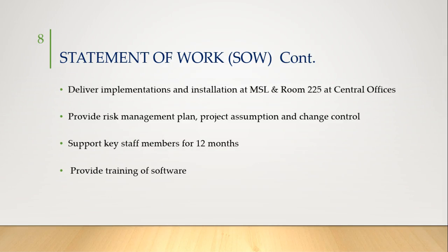Statement of work continuation. The supplier shall deliver implementation and installation at MSL, the previous school, and room 225 at central offices. The supplier shall provide a risk management plan, project assumption, and change control. And finally, the supplier shall provide support to key staff members for 12 months, the duration of the contract, and provide training of software.